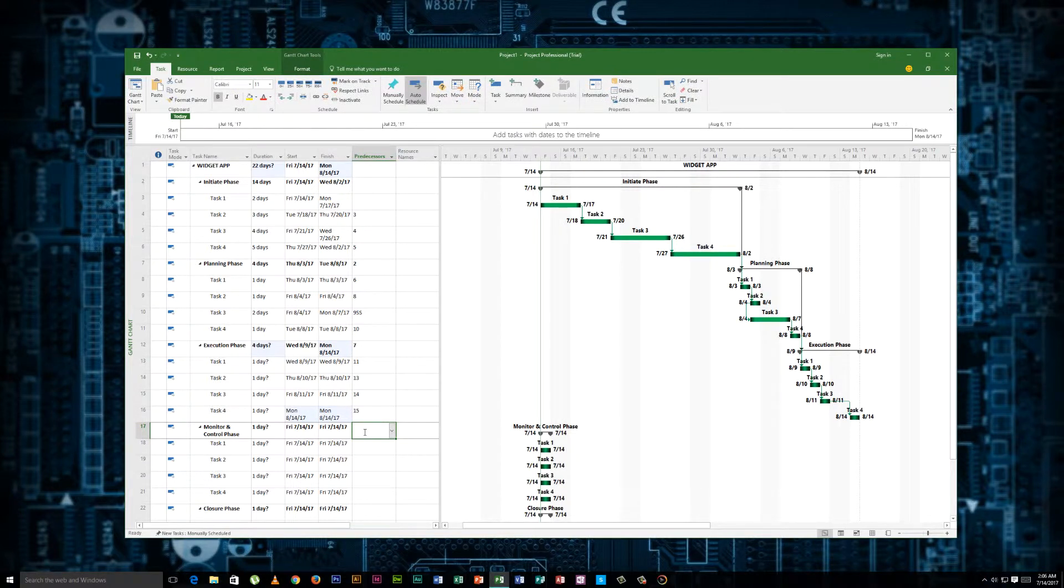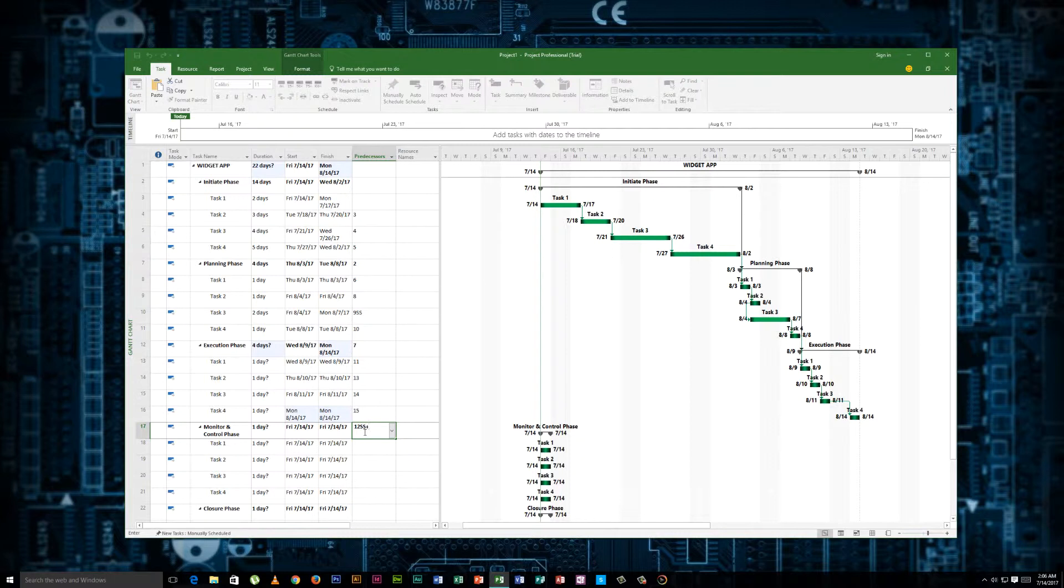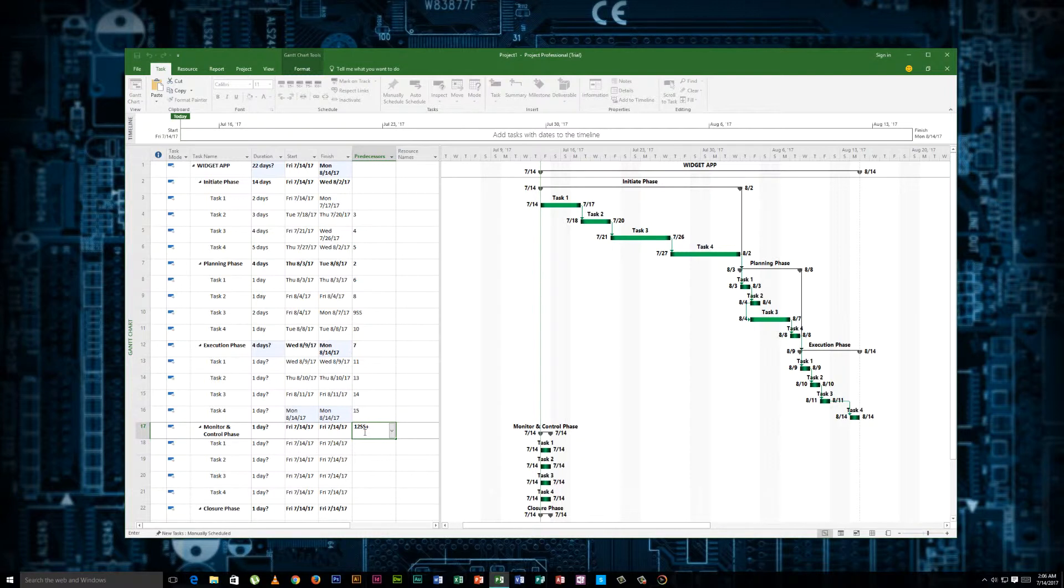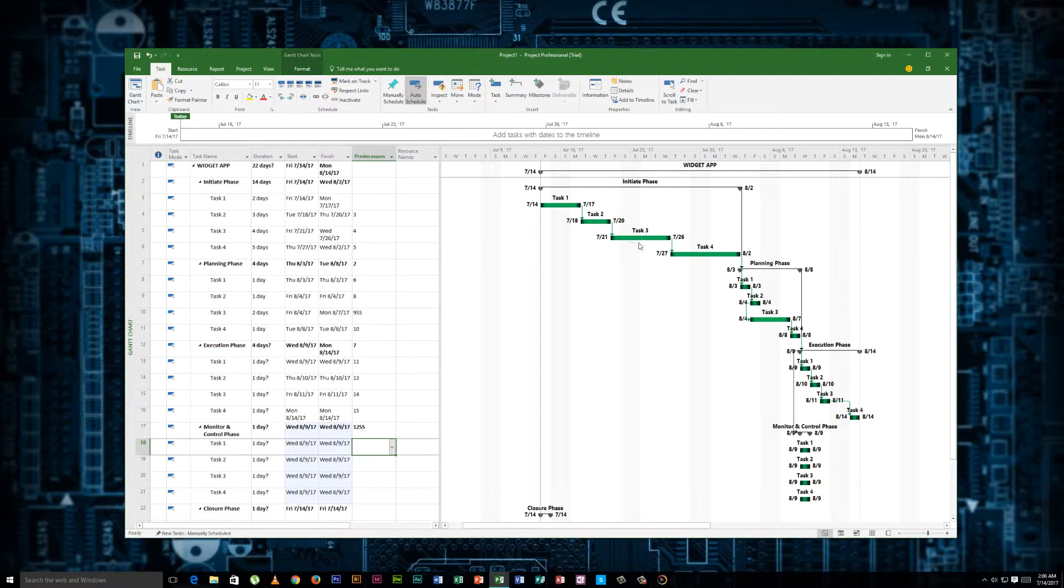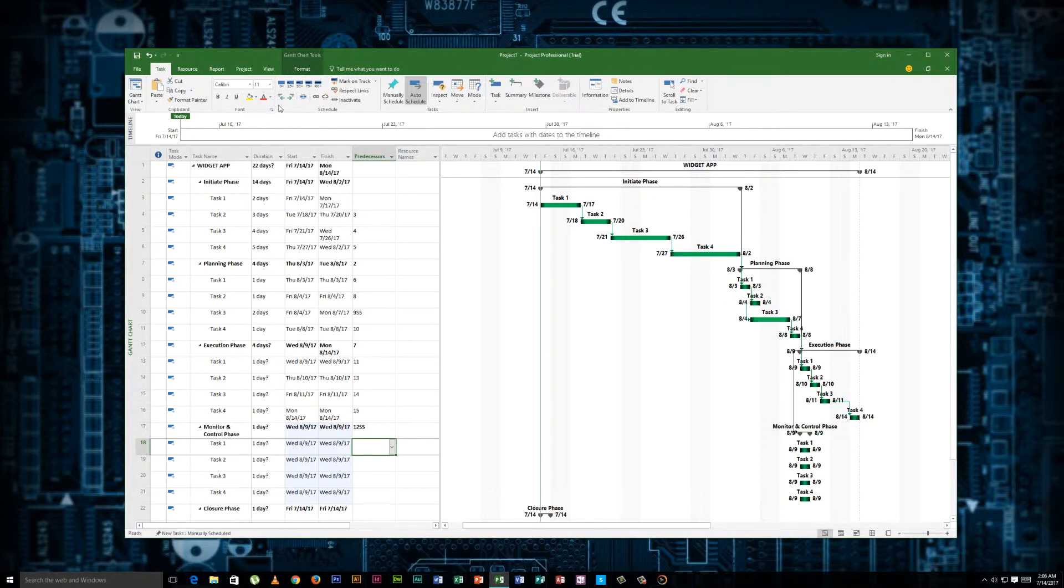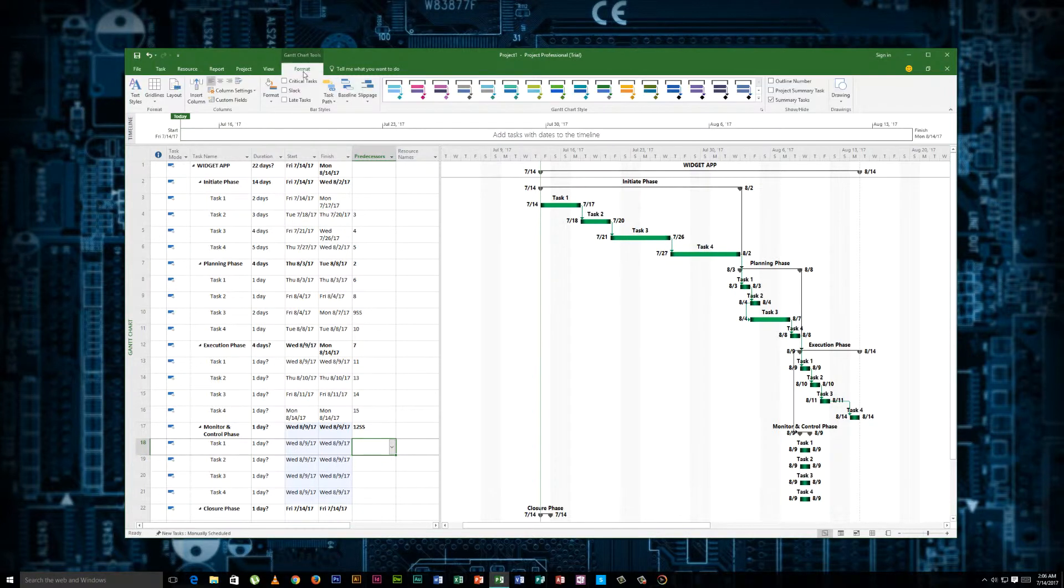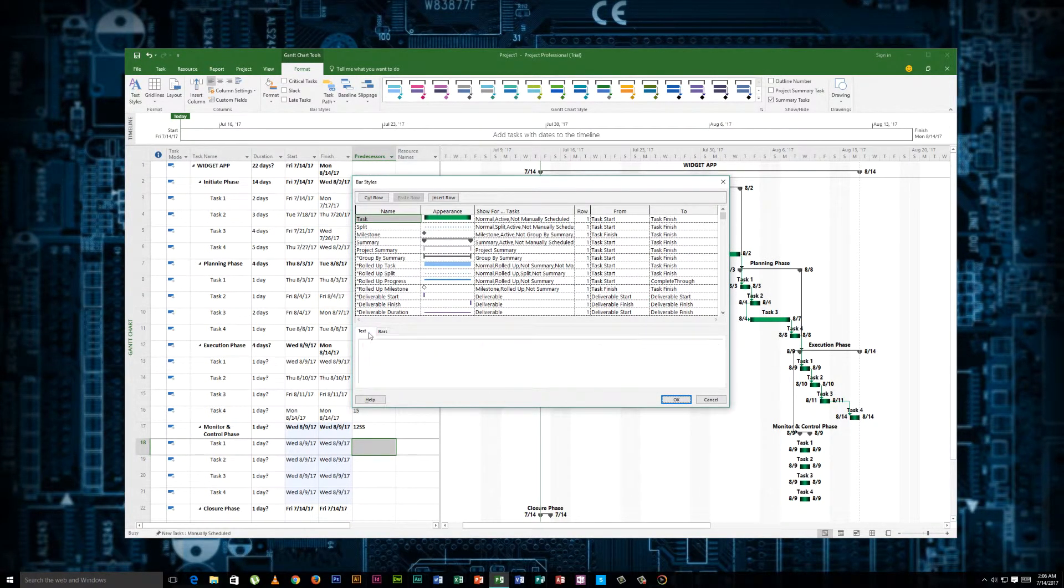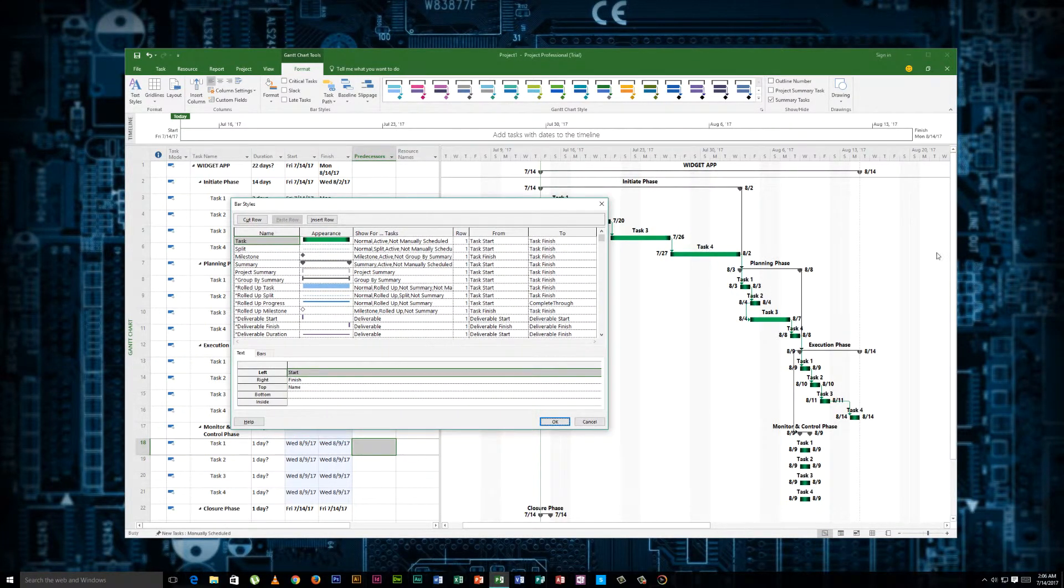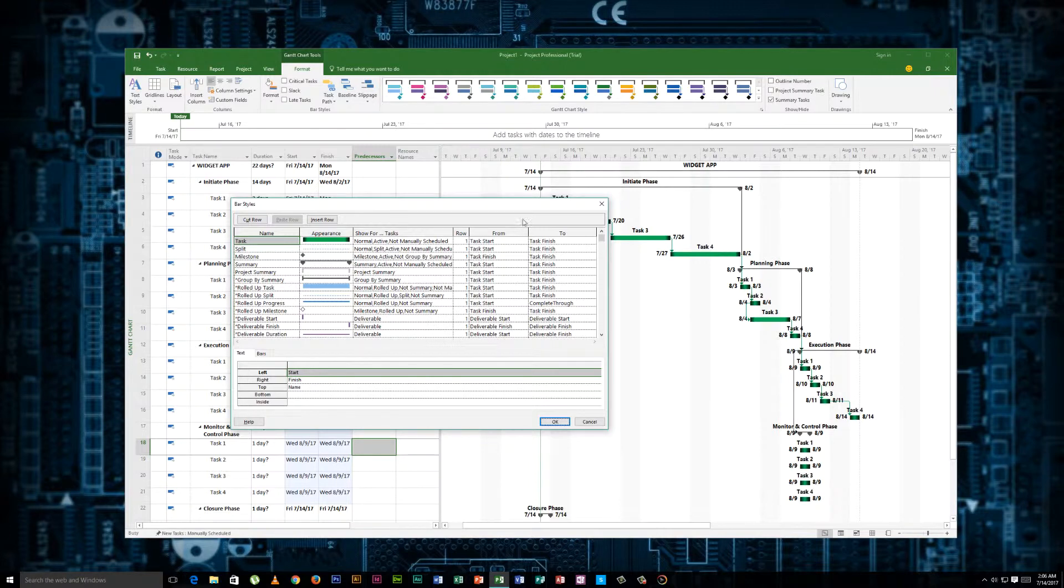Now we have a dependency on 12. 12 is also going to be a start start because your monitoring and control should happen when you execute, when you reach the execution phase of the project, because you're actually monitoring the work. I'll put that at zero. Okay, so you see it starts here and you see your dependency. So these little lines basically are just your dependency. This task is connected to this task.